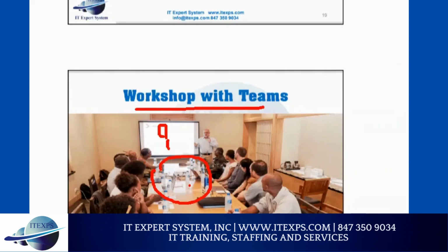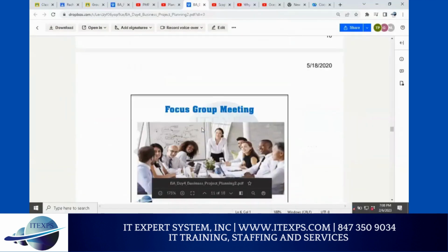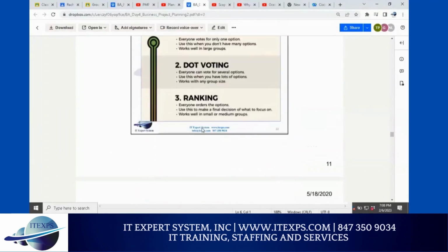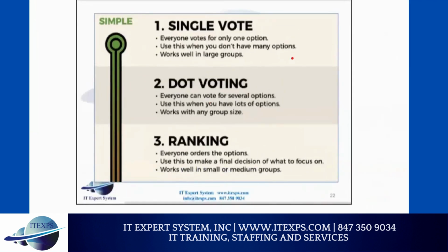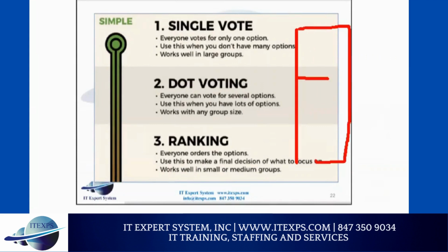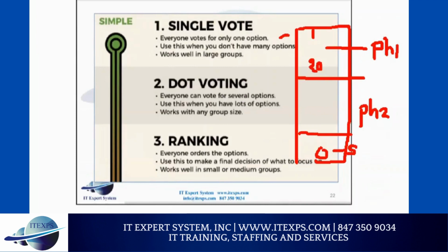Are we including that? Once you combine all those things, you come up with the prioritizations. Prioritization means, okay, I cannot do everything, but we are going to do only these items. What would be the 1 to 20 items we should work on? And that would be phase one. Then you will define phase two. Make sense? And something you will say is out of scope. So phase one means you're going to plan for this project, and then you will plan for the next.